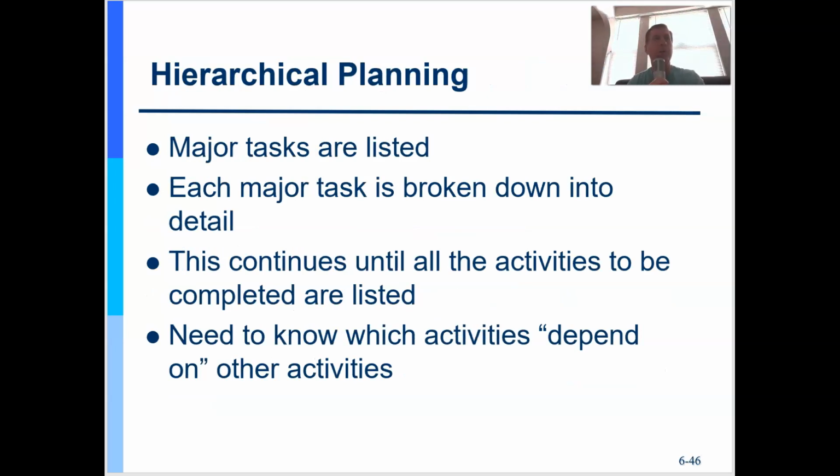It also contributes to hierarchical planning. So in a work breakdown structure, I'm going to identify the major tasks up top, and then I'm going to continue to break those down into smaller tasks. So for example, if I'm going to build a bicycle, that's my project. I'm going to put the bicycle right at the top, and then down at the next tier, I know I need to build a frame, need to build handlebars, and I need to build tires.